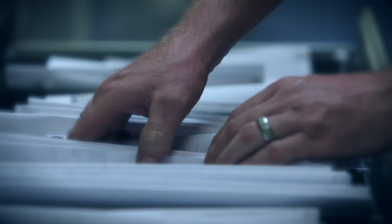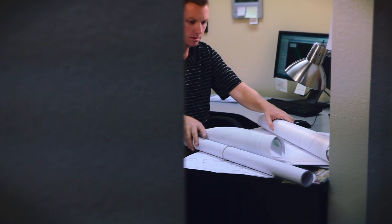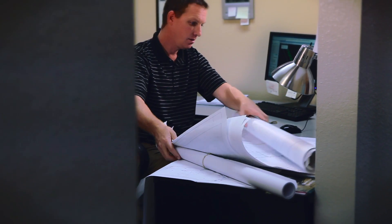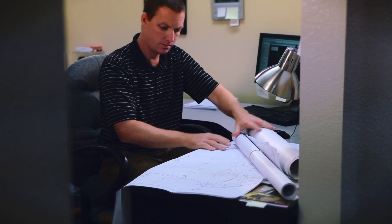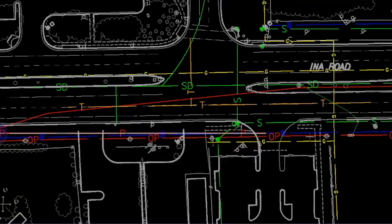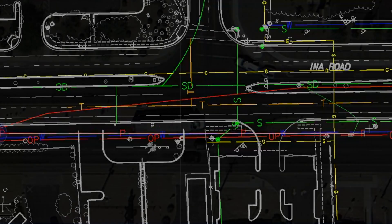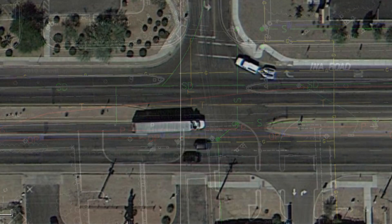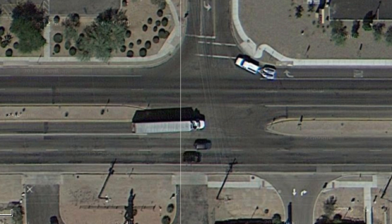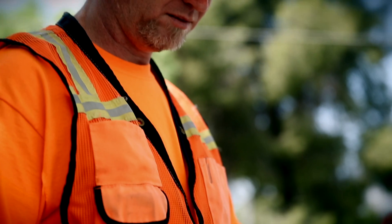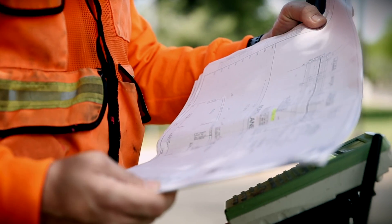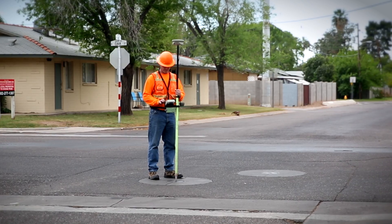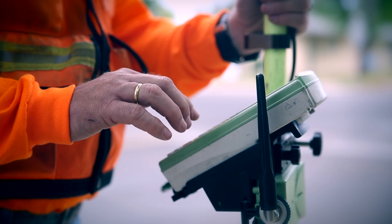Quality levels C and D are used for early project planning. At level D, plans are simply obtained and compiled as a starting point. Quality level C takes us one step further by correlating the visible utility features with existing utility records.